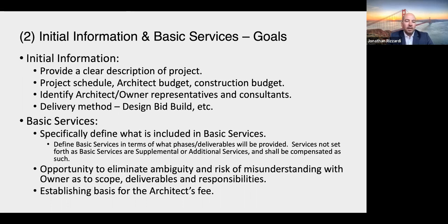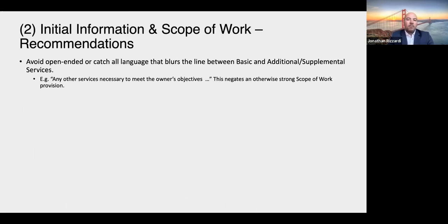So in other words, define specifically what your basic services are, and then put everything else in the bucket of supplemental or additional services. Make that distinction very clear. Again, it's an opportunity to eliminate ambiguity with respect to scope, deliverables, and responsibilities, and it establishes the basis for your fee.